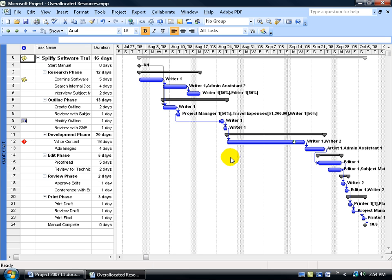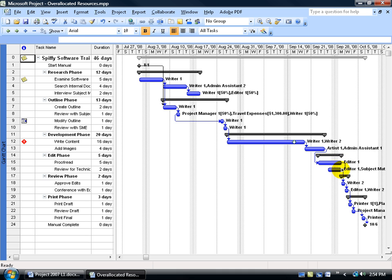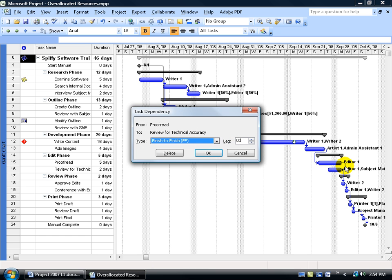For example, before we go to the first screen, you can do a little detective work and look at these two tasks here: proofread and review for technical accuracy. Notice the editor is working on both tasks at the same time. In fact, both of them look like they're finishing at the same time — it's a finish-to-finish relationship. If you double-click on that thin blue line, there it is — finish-to-finish.